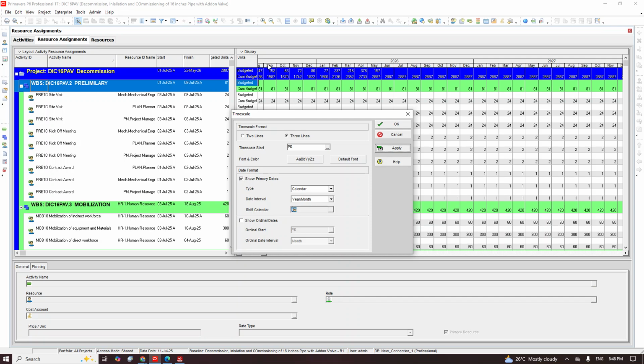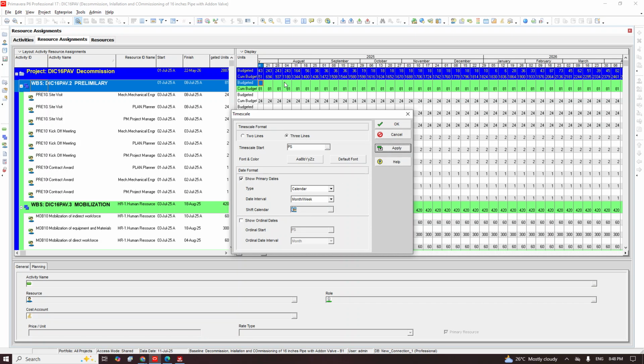If you want the title here, it will be on monthly basis. But if your project manager is telling you that you are going to do this report on a weekly basis, but on a monthly basis you do a cumulative report, it means you are going to change your time scale to weekly. So you come here and select month per week. If I click on it, now you find out that here we now have each of the first day of the week. You see 24th, you see 4th, 28th, 4th, 11th, 7 days. That's how it's been changed.